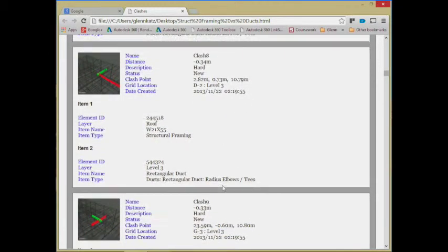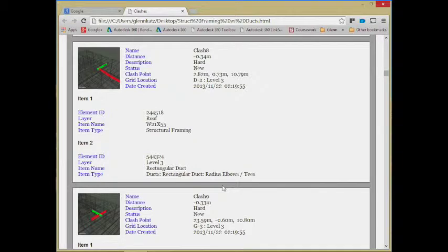So in a lot of organizations, you will receive a report like this, and it's your responsibility to go knocking these off one at a time, making some changes. Now again, to make the changes, you can't change them in Navisworks. Navisworks just reports. If you're the structural designer, and it's been decided that you're going to fix or move something, you have to change it in your structural model. If you're the mechanical designer, you go into the mechanical model and change it.